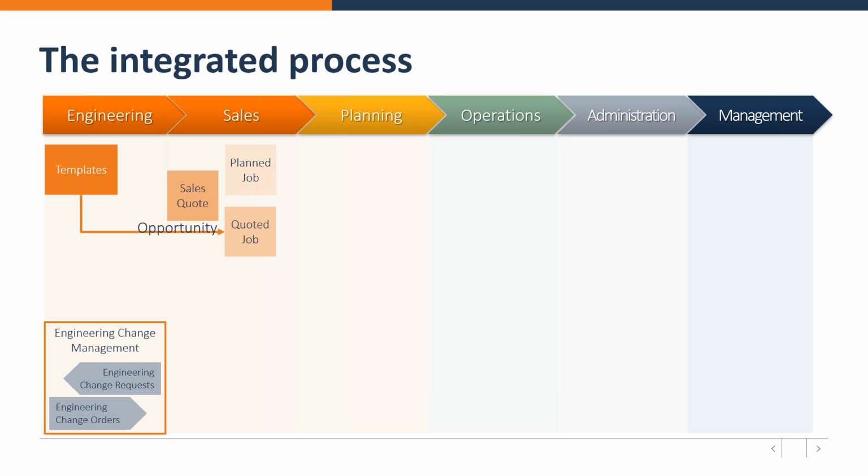Sales could then go ahead and begin quoting that job, putting in the required detail or information necessary to provide the proper bid to the customer. At that point, that opportunity is either accepted or rejected. If accepted, we create the job. We create the executable job. This executable job starts off with us also defining what those job tasks look like, similar to a work breakdown structure.